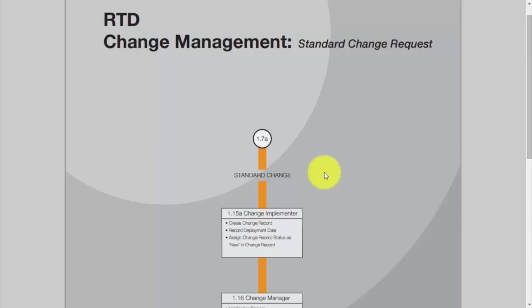And so a standard change is one that is accepted and for which we actually have an established procedure in order to provide that particular change requirement. So usually in these cases, the risk is low and well understood. The tasks are well known. They've been proven, they're documented, and authority is effectively given in advance in order to make these changes. And they would generally be minimal